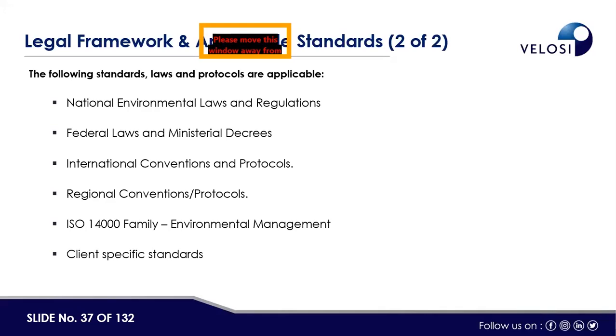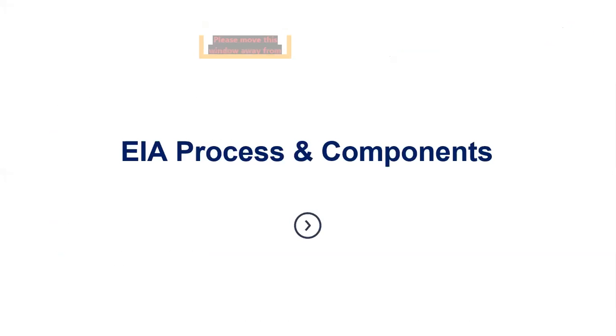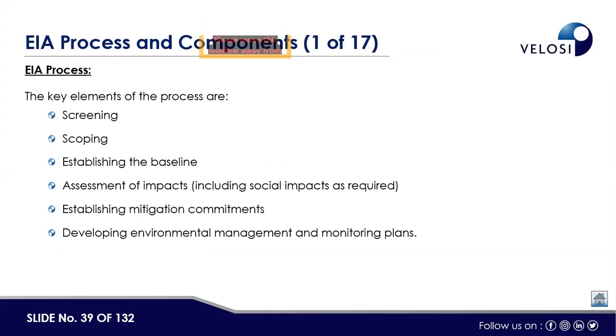As I told you, every country has its own standard, but the theme or the main soul of this is that every proposed project should have the NOC before commencement. Either at the design stage or any stage of the project, the proponent must get the NOC from the regulatory authority. Now I will explain to you about the EIA process and the components.